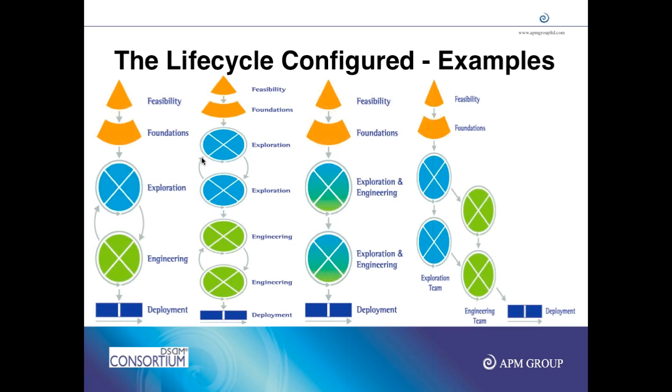The fourth one is used in the onshore offshore model. This is also something I have worked on. We had a product team onshore and a development team offshore. The product team was basically running through some time boxes to create user stories and specifications, and then they would pass it on to the offshore team who would do the design and development. While the offshore team is doing design and development of the first time box, the product team onsite has already moved to the second time box. So they have started collecting requirements for the next time box for the development team.